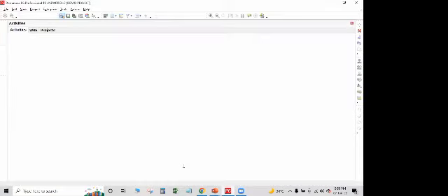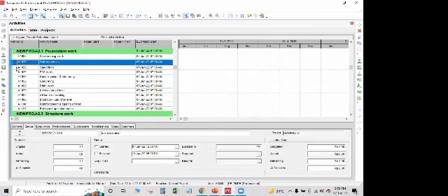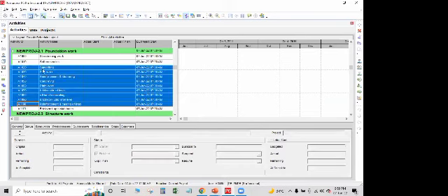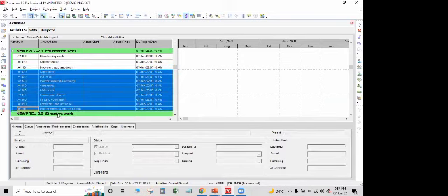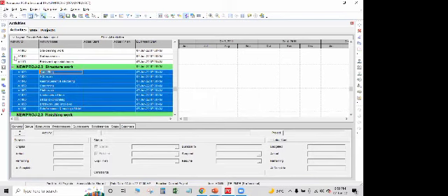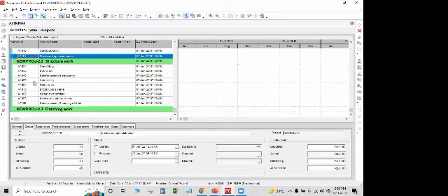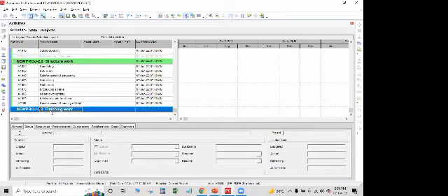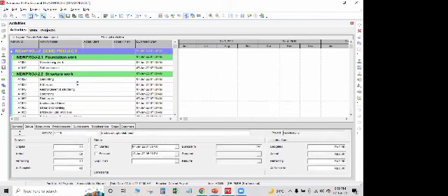अब आप यहाँ पर क्या कर सकते हो, राइट? जो भी एक्टिविटीज जहां पर भी बिलोंग करती है, लेट्स सपोज यहाँ से लेकर के यहाँ तक की जो एक्टिविटीज हैं वो मान लीजिए बिलोंग करती हैं इस WBS को, तो आप इस तरीके से यहाँ पे जा करके पेस्ट कर सकते हो, राइट? एंड फर्दर लेट्स सपोज if there's one more activity, this last one, then you can cut it and you can paste it here, right? So this is how you can easily import your schedule.